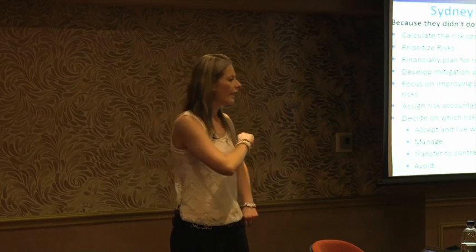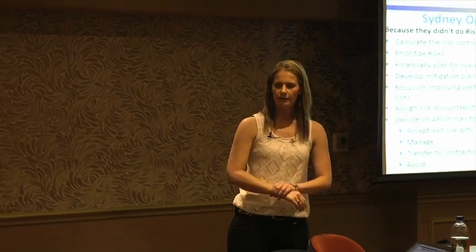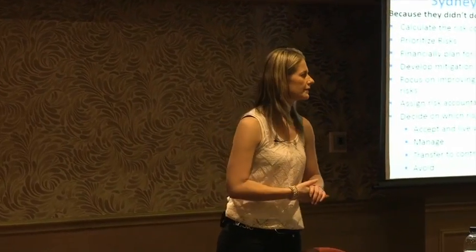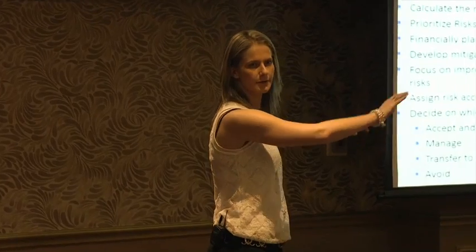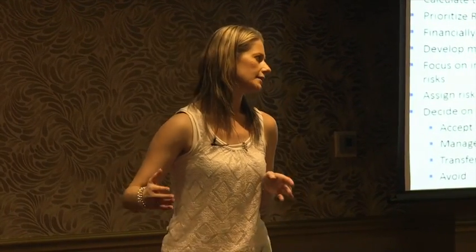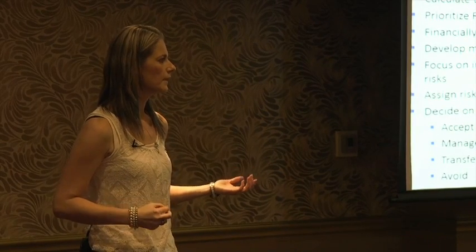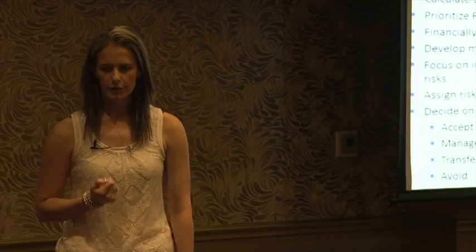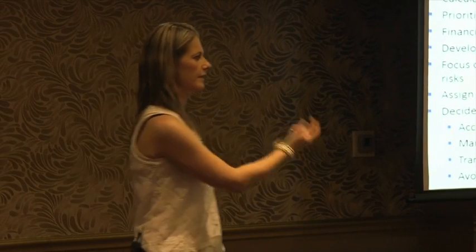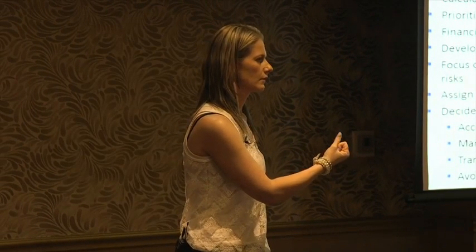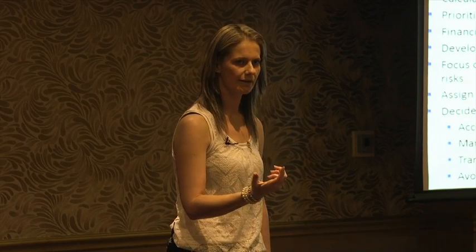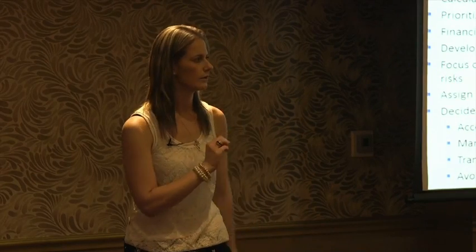Plus, now your valves get on site and you think it's all great, and then another discipline overruns and it poses a threat to schedule. So sometimes to overrun those 4 weeks has a bit more logic in it than just to throw money at it the entire time. So very important from a project risk management point of view: if we know what we face, we can know what decision to make. An informed decision. That's a very important word.